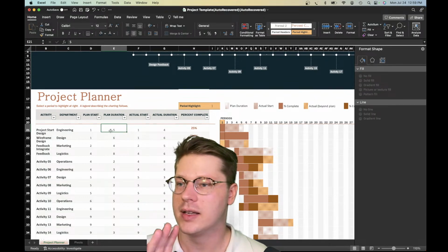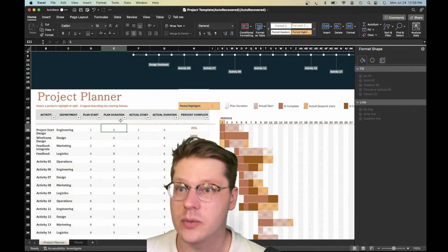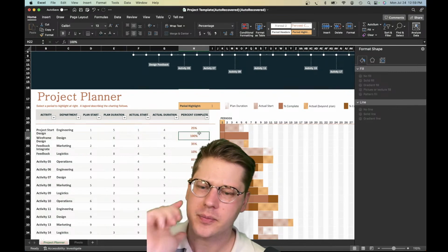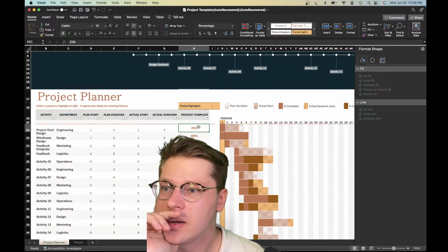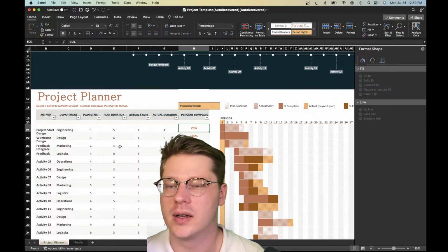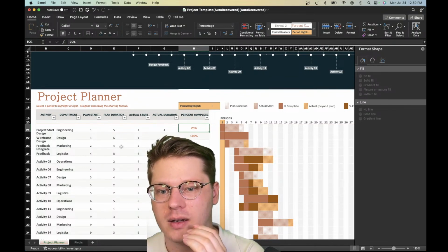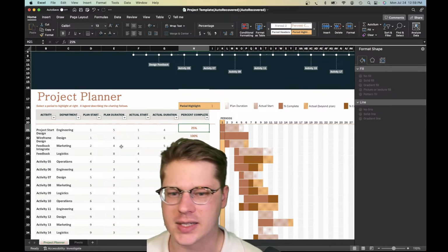And then we look at it through a different lens, which is how much of this plan has each department completed, and we do that by multiplying the plan duration by the percent complete, in theory, we should always be having either equal or less than for the multiplied value than from the actual plan duration itself, if that makes sense, right?